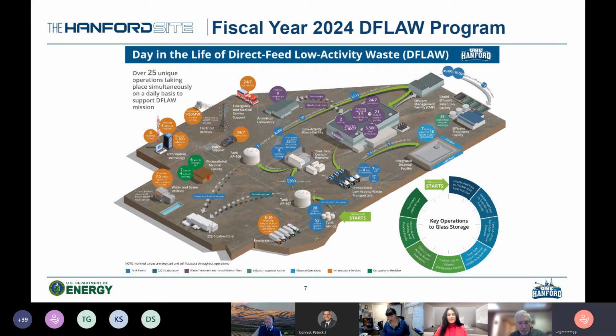When we look at a compliant budget request, we have to look at what work has been completed to date. For example, that report changes the second it's finalized and we do additional work. Some of the assumptions in that report may be outdated. So when we submit the request, we have to look at where we're at with what work's been conducted to date, and what we anticipate our budget planning may be in the year following that, because remember, we're on a 2-year cycle, so we're always 2 years out. So again, we have to look at the state of the site, and at things like this report. There's a number of things that we have to evaluate. We basically have to make any budget request that we put in as current as possible at the time that we submit it.